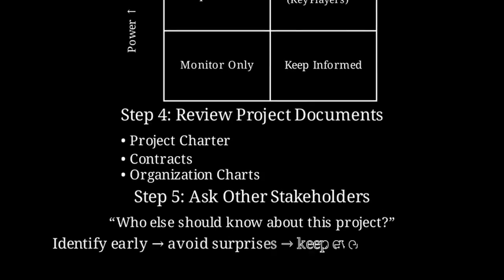Why is this important? If you miss a stakeholder, they can show up later and request big changes. Identifying them early avoids surprises and keeps everyone aligned.